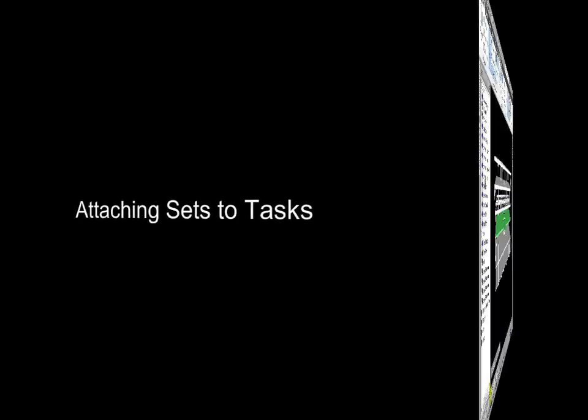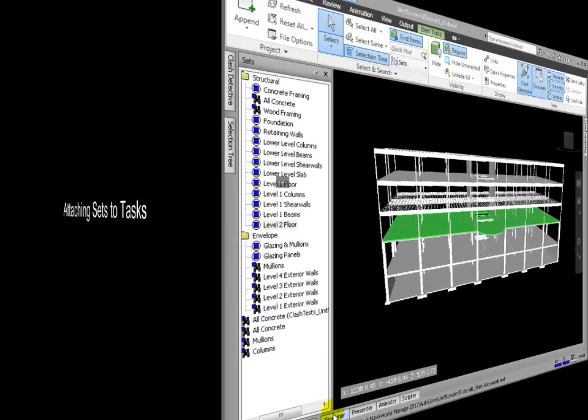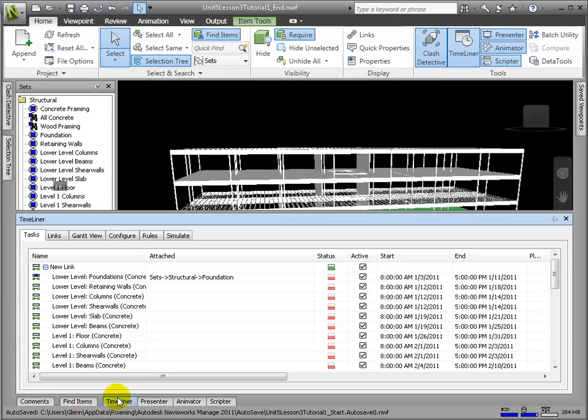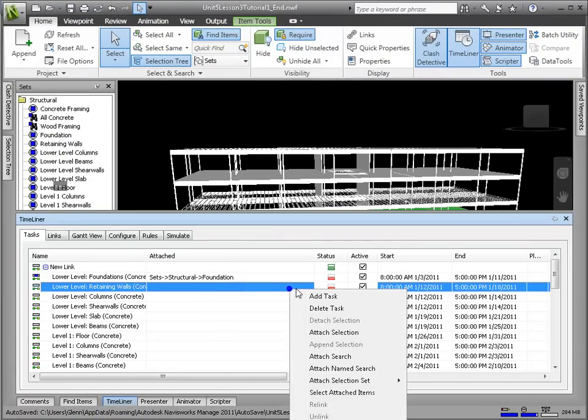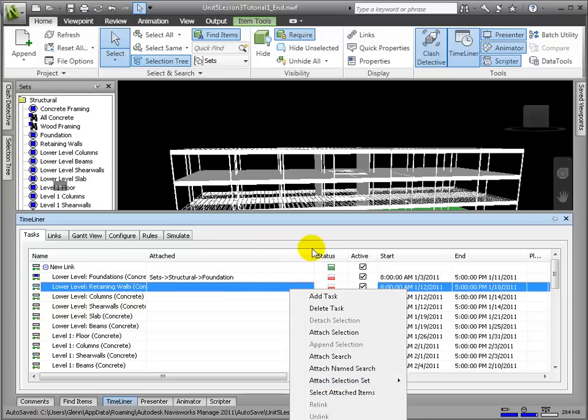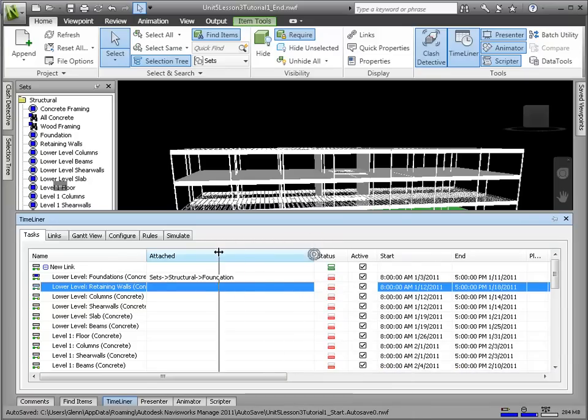Now we'll be linking these sets of elements directly to the tasks to which they belong. We'll right-click in the Attach column and choose Attach Selection Set. And then navigate through the file hierarchy to the right set.